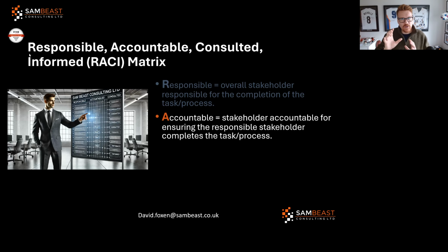So just make sure that when you're building your RACI matrix, have the process flow there with you. I like the swim lane ones, as you saw from the previous webinar, and you can see all of the stakeholders that are listed that are part of that process. When you're building your RACI matrix, have a look at this and make sure that you're matching up each action, each decision tree, each sub process, each document, each data update, etc., to the RACI matrix, and put the line item of what the action is, who's responsible, who's accountable, consulted, informed, etc.